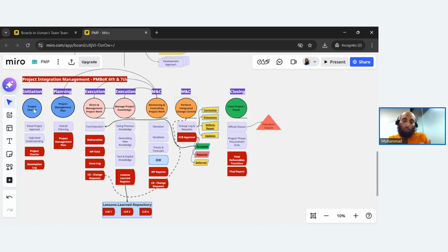And project charter is generally the first document. And again, I would quote Ricardo here because he uses the very right metaphor, because according to the standard, project charter acts like the birth certificate of the project. So without this, project does not exist. So you have a project charter on the project, and you get the official approval of proceeding with your project once you have the project charter signed and approved by your project sponsor.